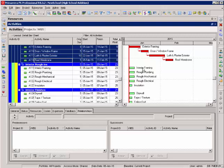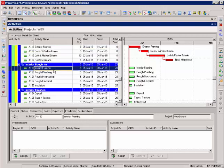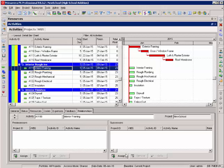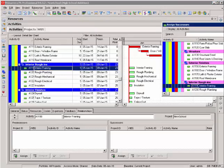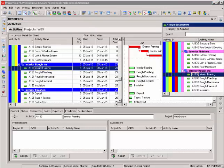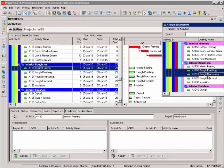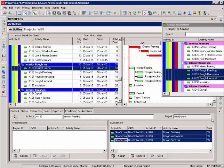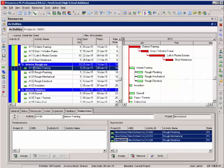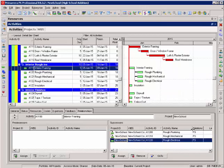I'm going to add some start to start relationships to my activities. My interior framing is going to start two days and then my rough plumbing, rough mechanical and rough electricals will add. Now the advantage of using these windows down here at the bottom is I can add multiple relationships to one activity at one time. I select my assign successors. By default it goes to my interior framing since it's selected. I can use my control key to highlight all three of those and it selects all three of those activities as successors. Down here in the bottom I can customize these columns, make one smaller. I can also right click and change the columns that are actually being displayed.